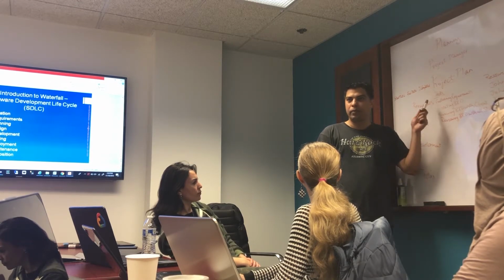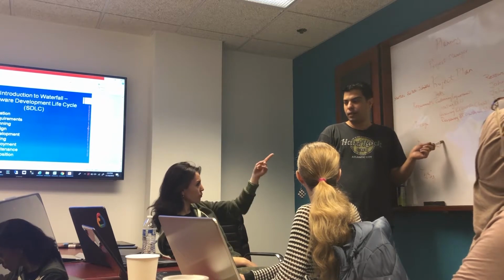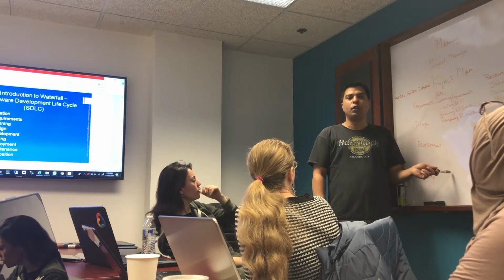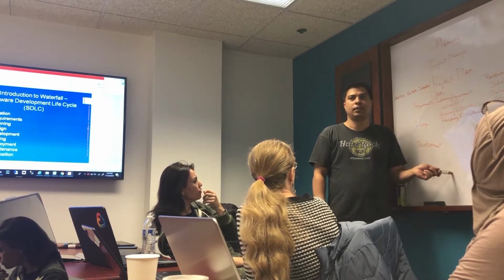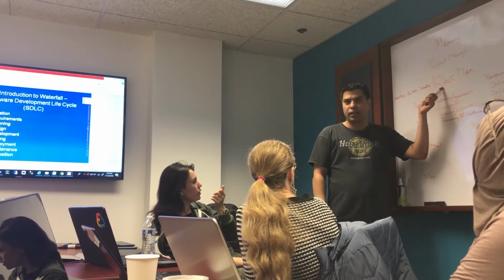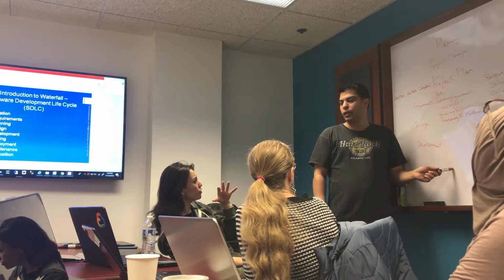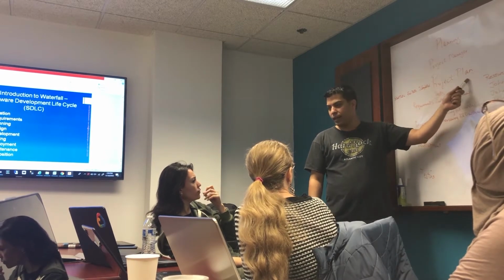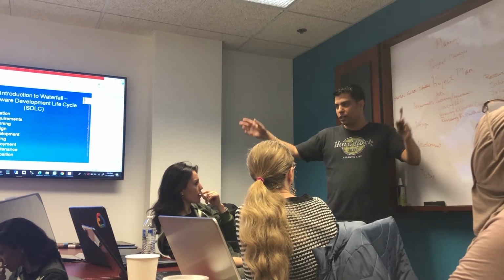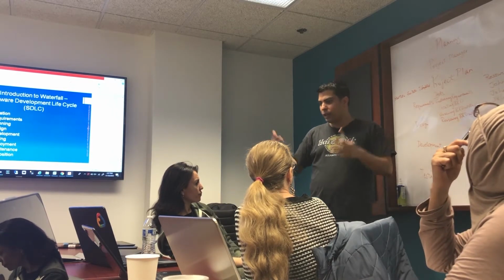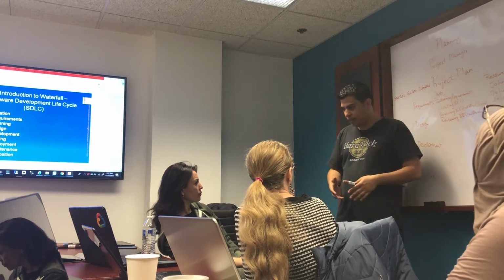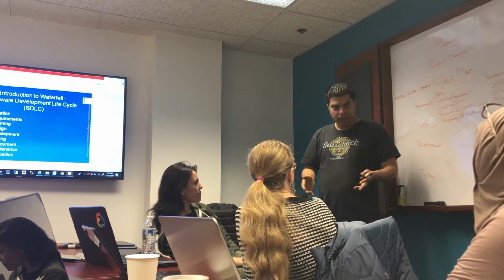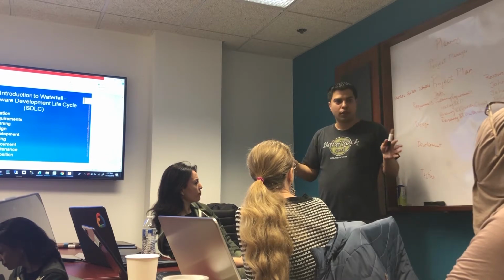Who comes up with these tasks? Not the project manager, their managers. The development managers of each team. And what do they do after they come up with these tasks? Give it to the project manager. And what does the project manager do? Manage the time. Put everything in a document called the project plan, and then distribute it to all the stakeholders. Please review. This is what you had sent me. Is everything correct? Anything that you disagree with? Okay, everybody says everything looks good. We are good to go.